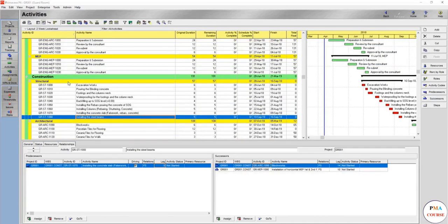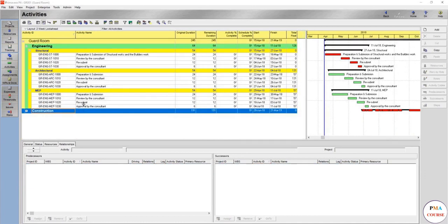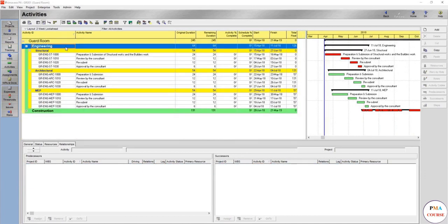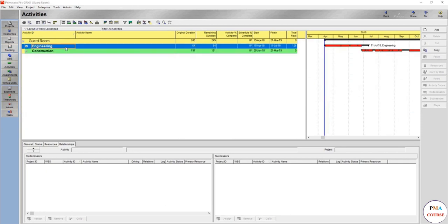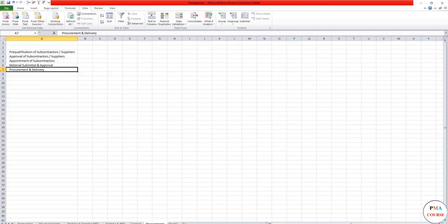Welcome back. We have created the construction activity list and sequenced it, and also created the engineering activity list and added the relationships. Now it's time to add the procurement activities. Procurement means making or buying goods or services from anyone outside of your company — even if it's within the organization but a totally different department that you have to go through all the procurement procedures. Let's have a look at what procurement steps we have in any project.